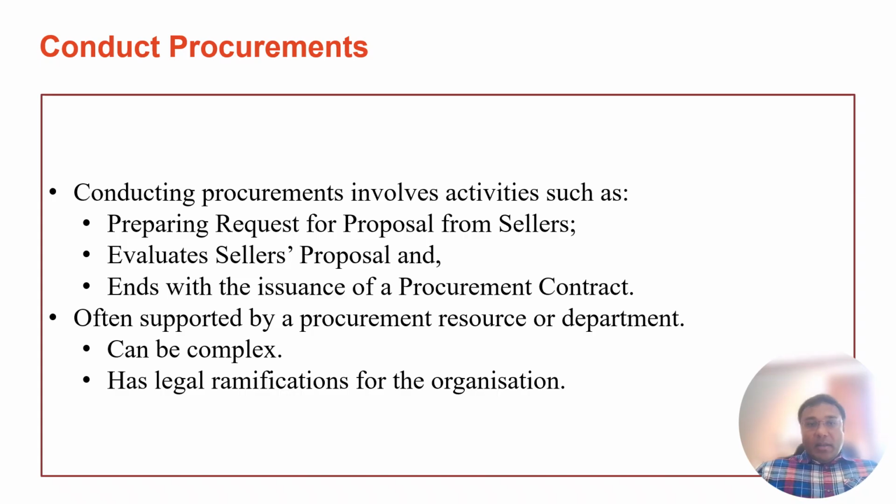This is where the plan is put into action. So accuracy and fairness are the key. The purpose of conducting the procurement is to obtain seller responses, select the seller and award a contract. So what are the key activities? You advertise the opportunity or invite qualified vendors. You obtain proposals, quotes or bids and evaluate their responses using predefined criteria.